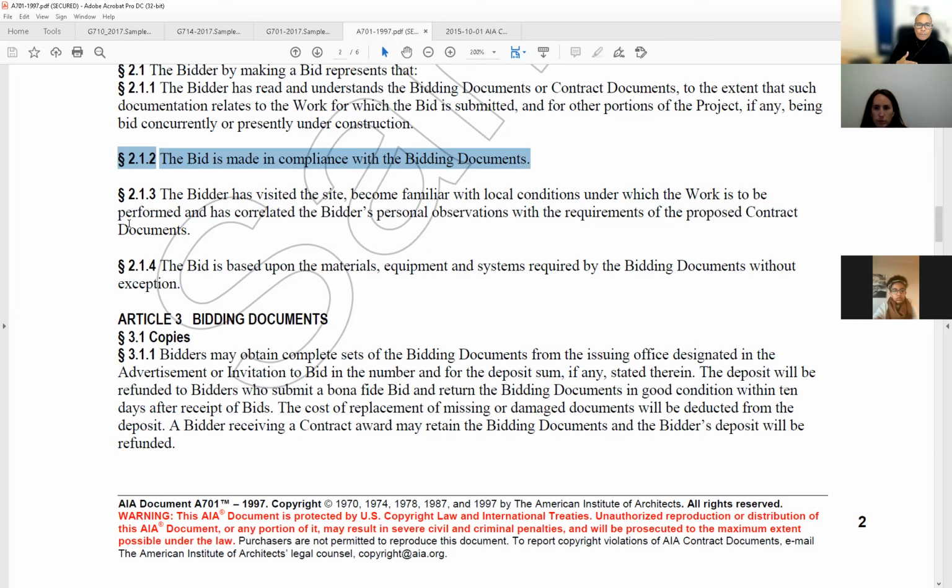This is what puts a lot of companies out of business out there, when they misread something, misunderstand something, and underbid something. You probably have heard of that. And they go bankrupt, literally. When they discover the problem, they're out. To be honest, they actually withdraw their bids, and we actually have a bid security deposit, and we also have a bid bond, which is an insurance company, basically, that will insure that bid and pay the difference for the next bidder that gets selected.